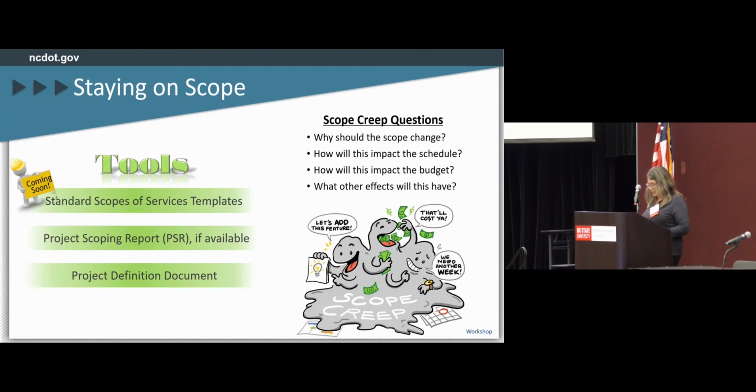And then during stage two, the project management guide introduced an optional project definition document, or the PDD. The PDD can be developed by the project manager in collaboration with the team, used to clearly define the scope, and you can include both what the project is and is not. To me, I see the PDD as a beneficial tool in pulling folks back together when the scope creep conversations start. Having an assigned document that you can remind your team of the true purpose can be a very non-confrontational way to start to challenge folks and reel things back in.